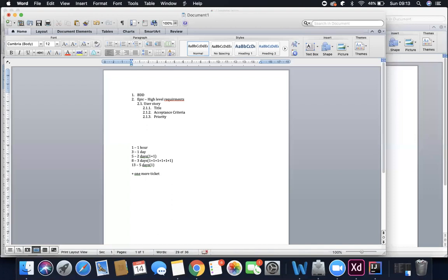Okay. 8 points. So see, this is exactly what happens in sprint planning. Everybody will give the estimates. Example, we are all in sprint planning, 8 to 9 members. I'm the Scrum Master, I'm asking everyone. Everybody has given estimates, so it is not that it is wrong or right. Now I will not ask anyone who gave 8, because it looks like that will be the good answer. If it is not, 2 people, 4 people will not make the same mistake, right? So now the question I need to ask is why 5 and why 13?